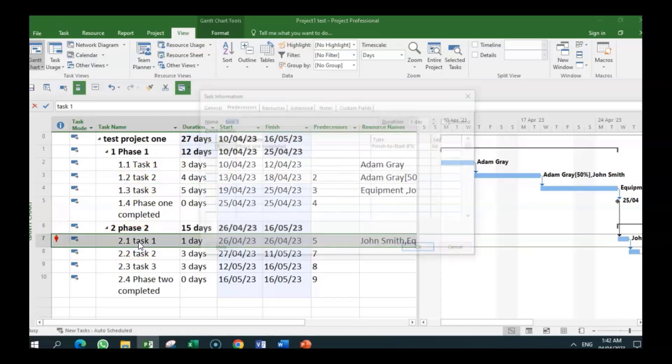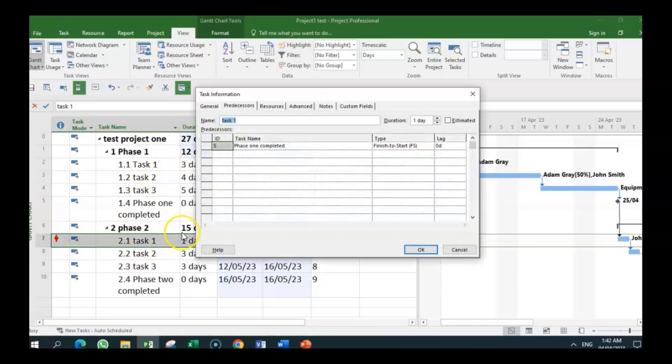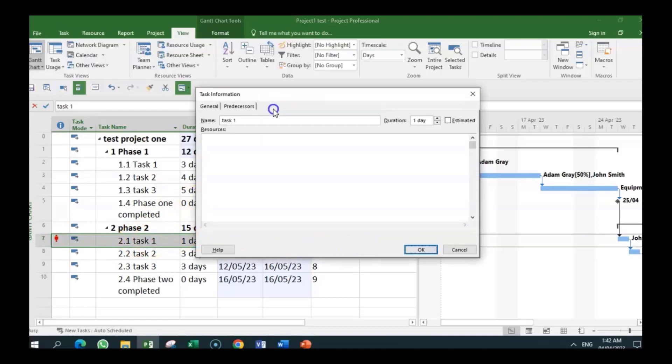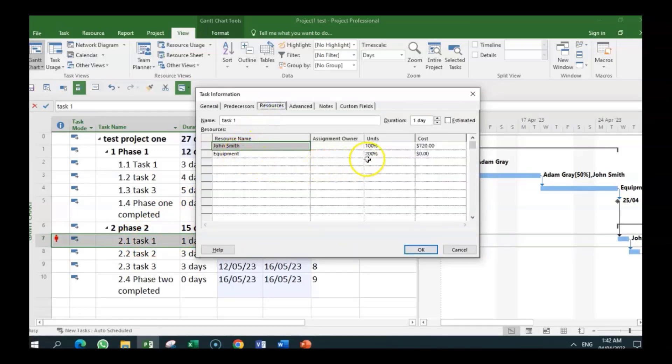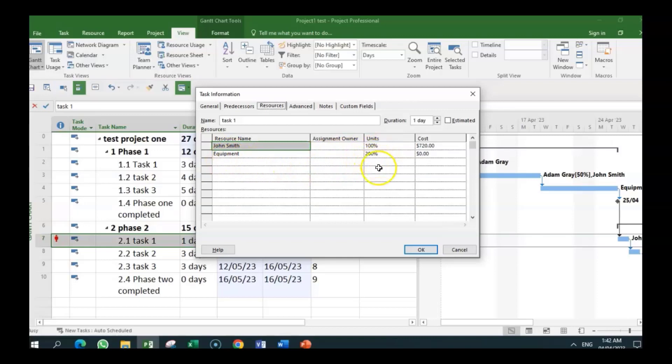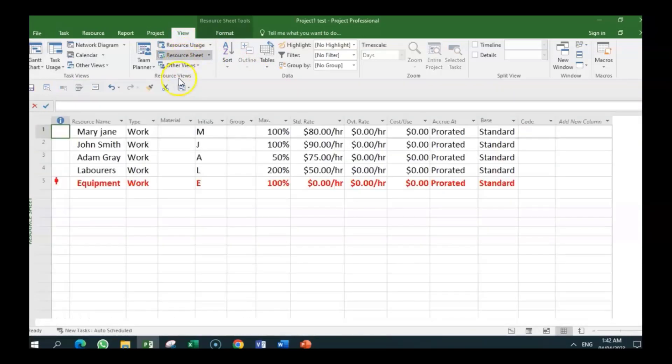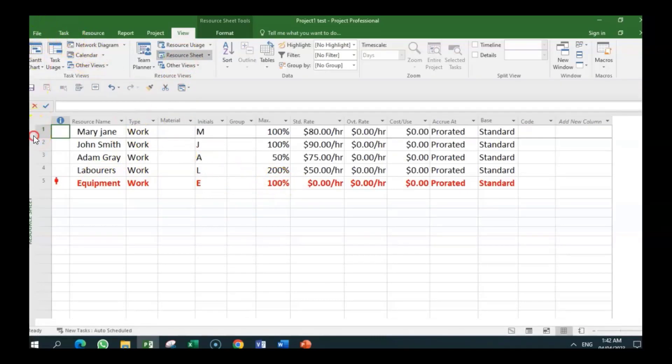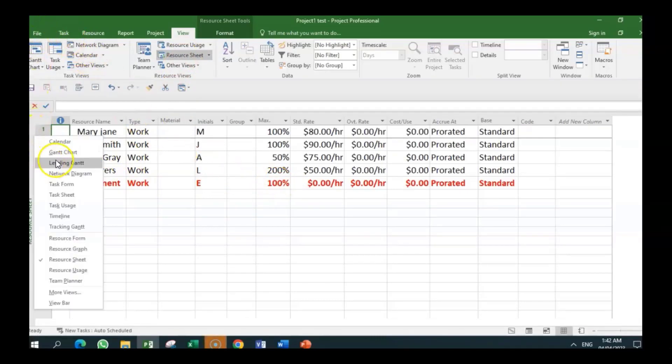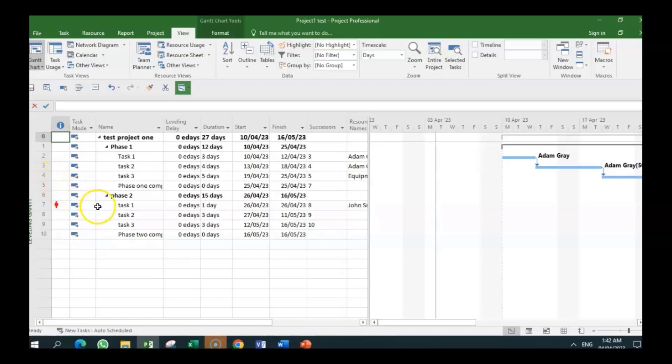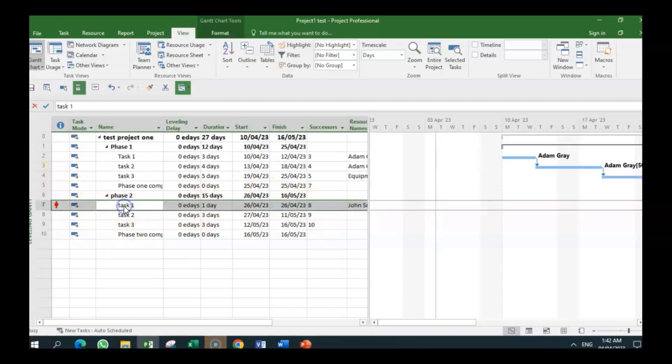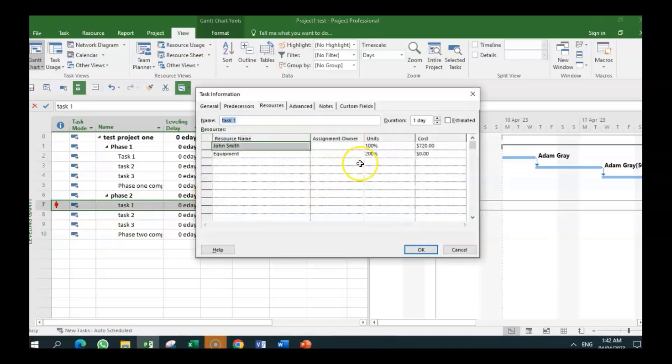So let's investigate the third case, which is task two, and we're going to see what is the situation. The resource here is we have equipment. We have John Smith and we know he has 100%, but we have equipment and that is 200%. So is there a problem? So we go back into the resource sheet. Anytime you are checking things, you go to the resource sheet and equipment. There's only one piece of equipment, but yet on that particular task, we had allocated two pieces of equipment. And this is what had caused the over-allocation.